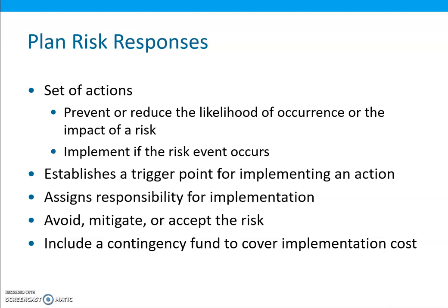A risk response plan can be to avoid the risk, to mitigate the risk, or accept the risk. Avoidance means to eliminate the risk by choosing a different course of action. Examples of avoiding risk would be to decide to use conventional technology rather than advanced state-of-the-art technology in a new product, or to decide to hold a weekend festival indoors to avoid the possibility of a rainout.